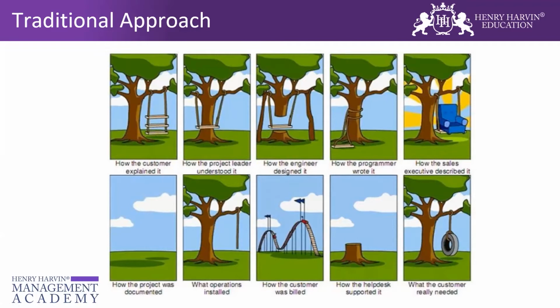Now, if you do it in traditional, I would have gone through all 8 steps, and therefore the amount of effort to make a change is about redoing all 8 steps. However, if you have only gone to stage 2 in agile, the amount of effort is much less, because you only have to revert the changes from 2 to 1.